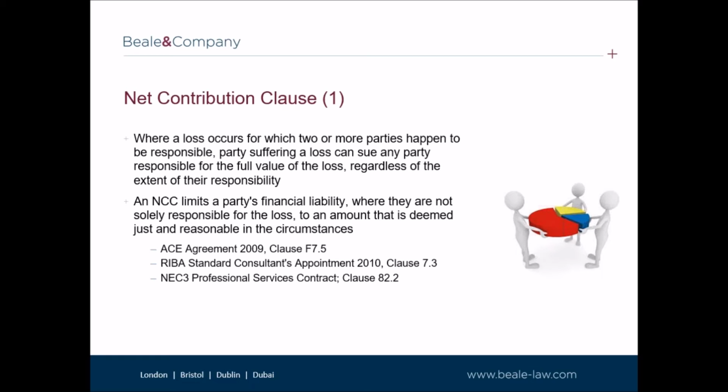In such circumstances, the liable party would be left to recover from the other responsible parties under the Civil Liability Contribution Act. This clearly exposes the consultant, or the responsible party, to the time, expense, and risk of pursuing a claim for contribution. Moreover, the consultant would also carry the insolvency risk, as no recovery will be possible if the other parties responsible are insolvent, have no assets, or obviously no professional indemnity insurance.